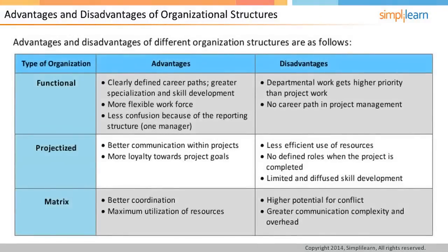Each organization structure has its own set of advantages and disadvantages. The advantage of functional organizations is that resources may find clearly defined career paths and achieve specialization and skill development in their respective fields. It will be a flexible workforce since only one manager will be responsible, avoiding confusion. The disadvantage is that project work is hampered — department work is always given higher priority than project work.